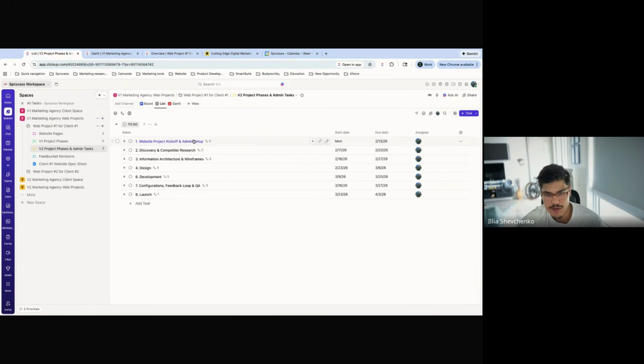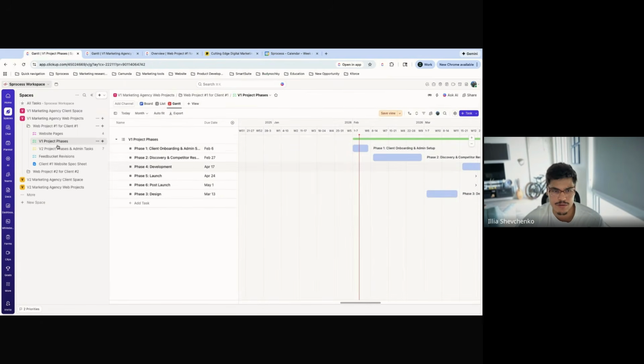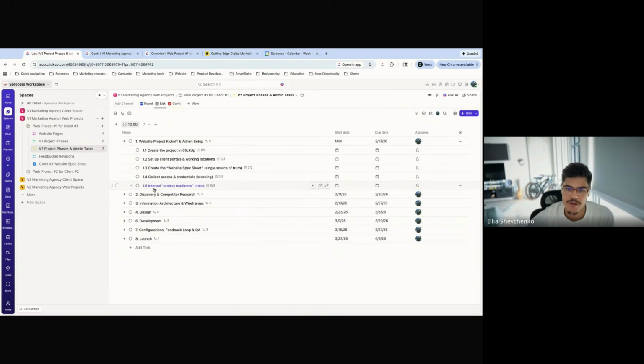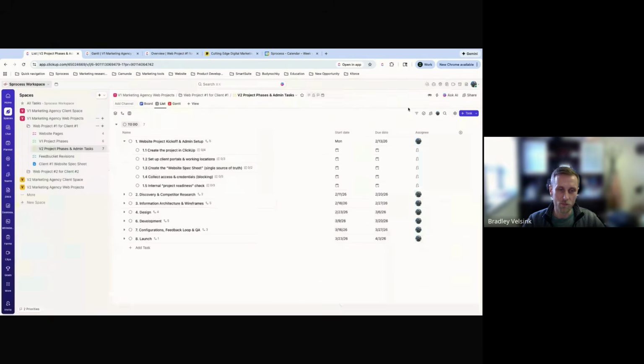And I don't think I have the right names here, because I just put them based on the discussion we had. So the project phases are slightly different from the phases I have here, but we can adjust that. But the point is, for each of these phases, I would probably go with V2. For each of these phases, we can have these big chunks of work separated as subtasks. And for each of these big chunks of work, we can have a checklist inside the task that's going to walk us through what needs to get completed to get this done. Something like this. Yeah, I like that.